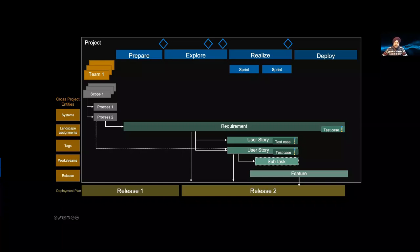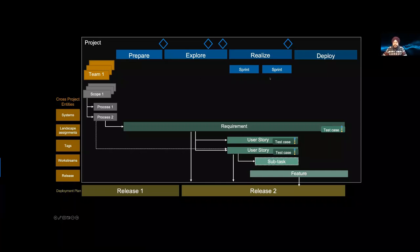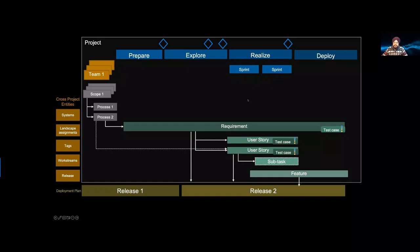You have the option to break requirements into smaller units called user stories. Typically, requirements are assigned to a release — the larger time slice — while user stories are assigned to a sprint. SAP Cloud ALM gives a lot of flexibility: you can model overlapping sprints, overlapping phases, and overlapping releases, based on real project feedback. For example, sprint one may be used by team one and sprint two by team two with different calendar week definitions and a slight overlap. Nice reporting lets you see this visually and fix it immediately.